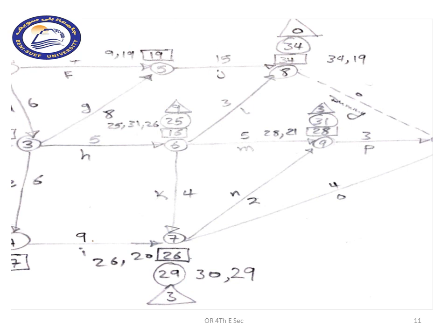The first one is from node 10 to node 7, that is 34 minus 4, that is 30. But the time from node 9 is 31 minus 2, that is 29. Here, when we deduct, we will choose the lower amount.